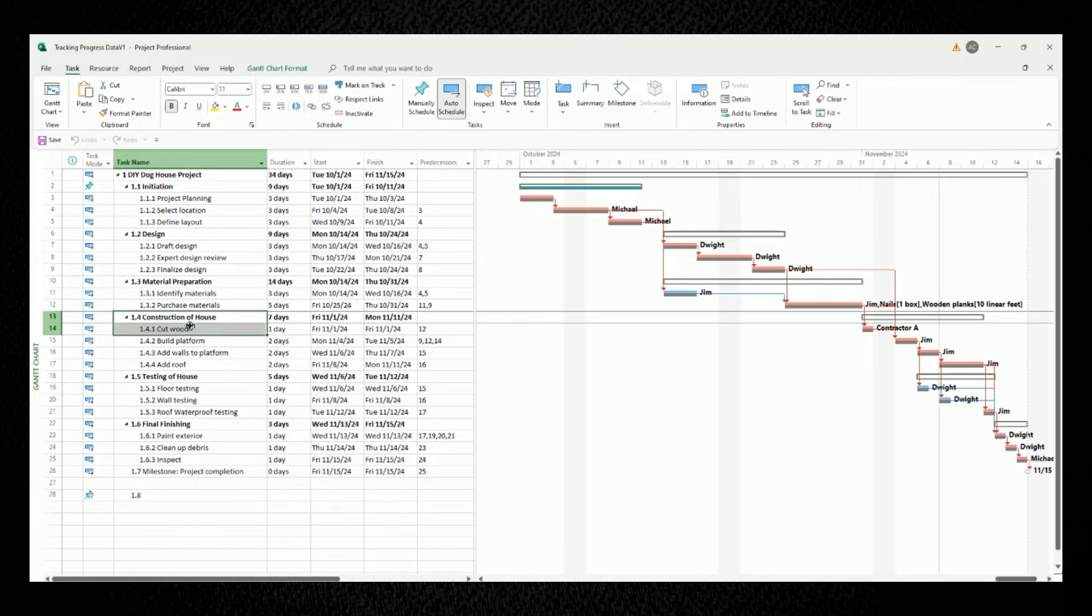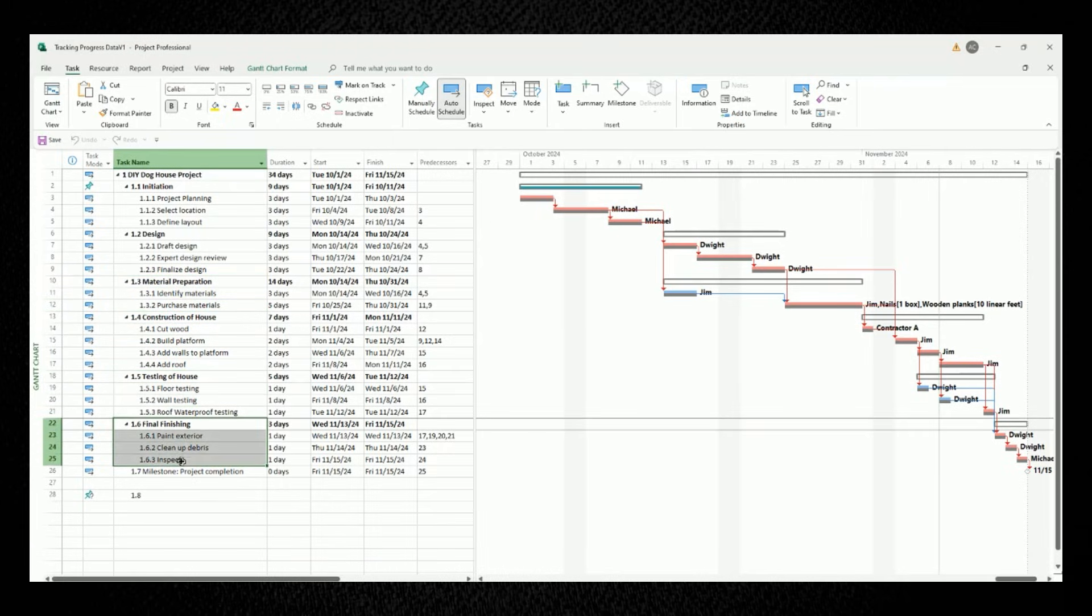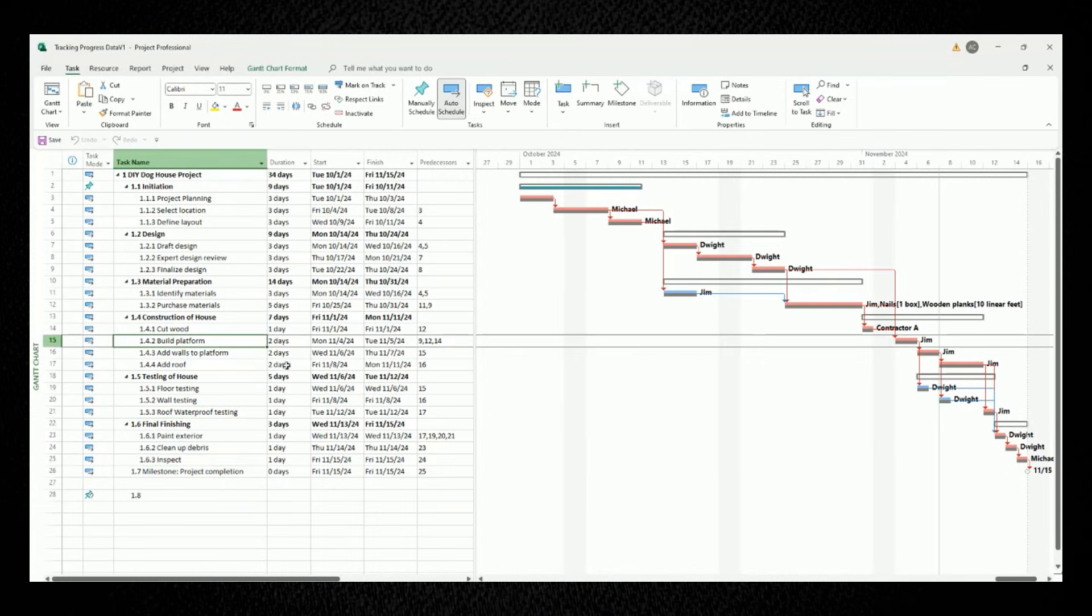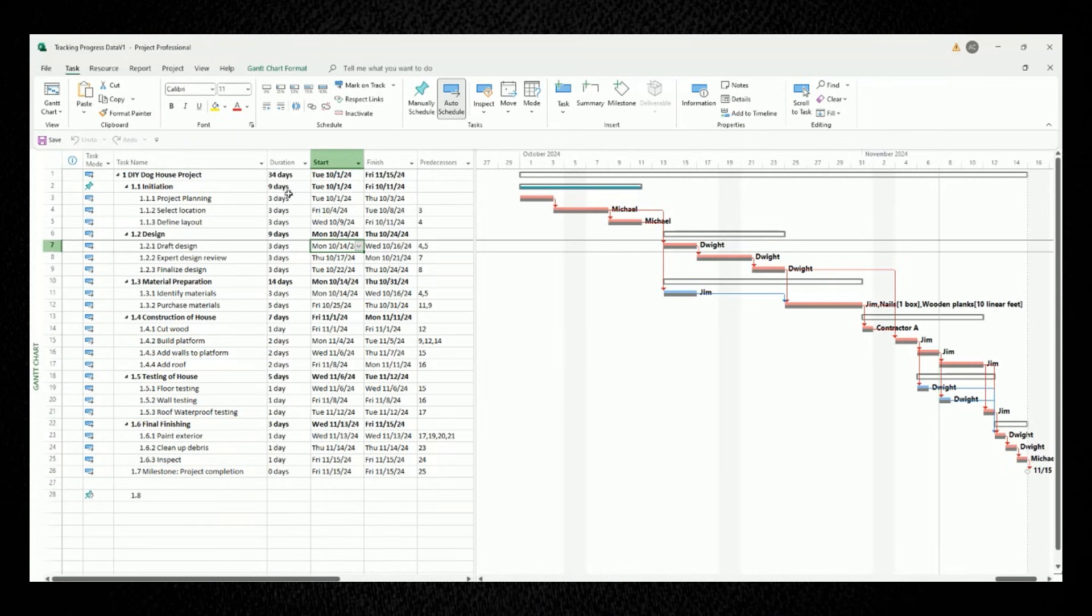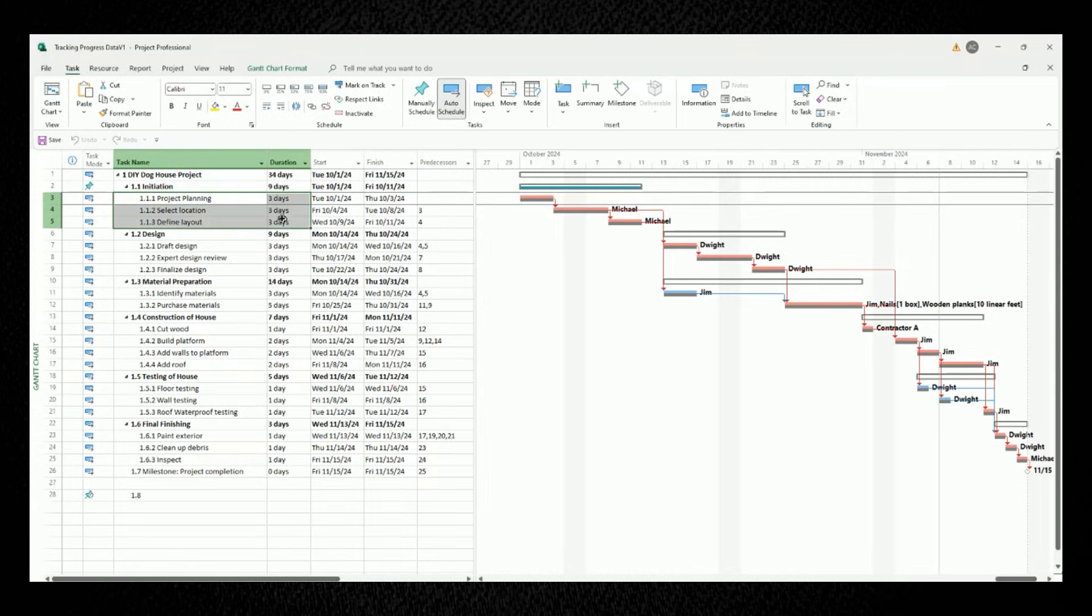I've also inputted estimates for the duration of every single task. For example, under the group of initiation, I've assigned estimates of three days each for project planning, selecting the location, and defining the layout.